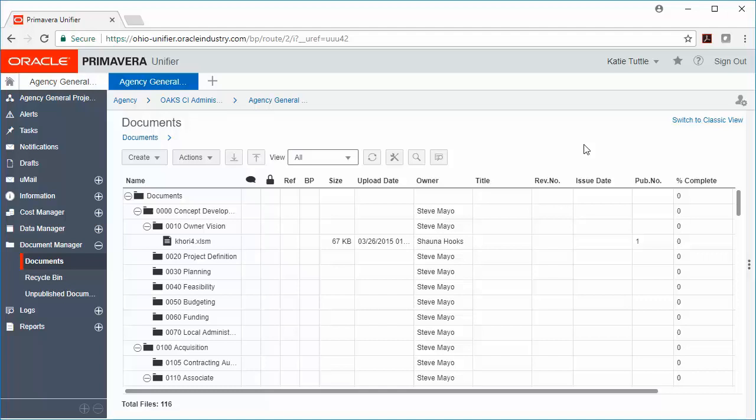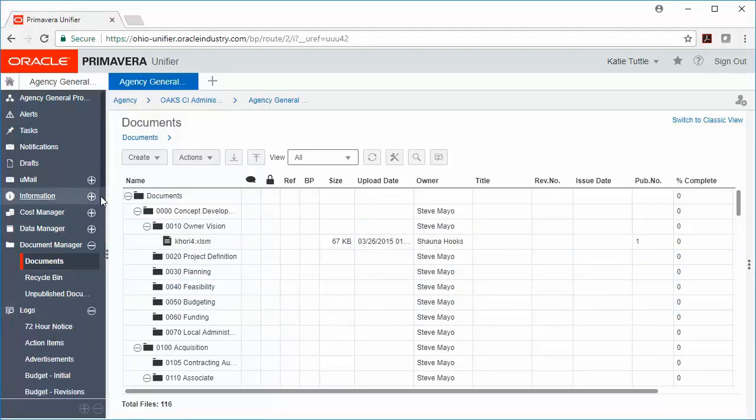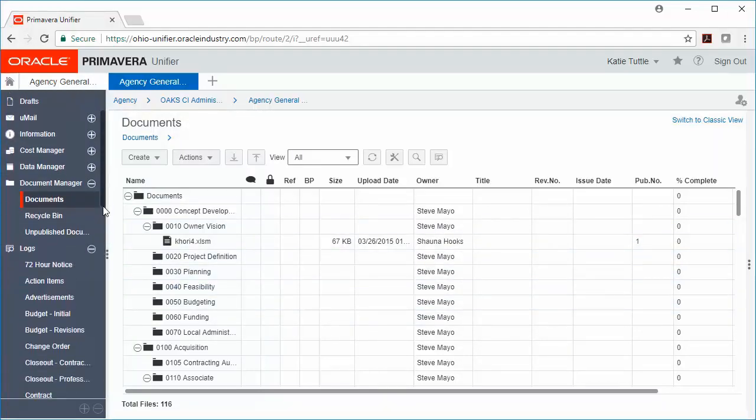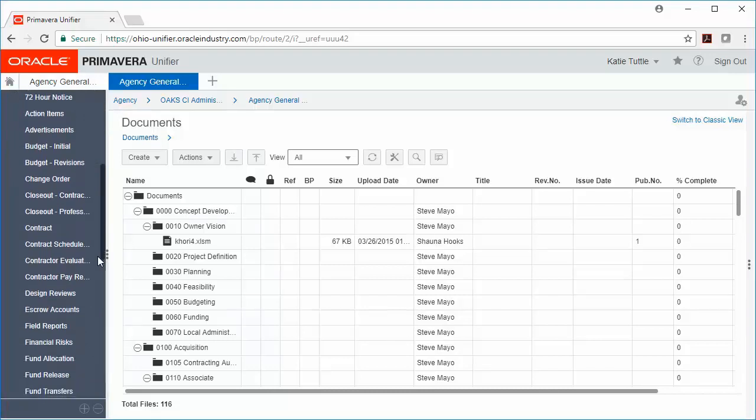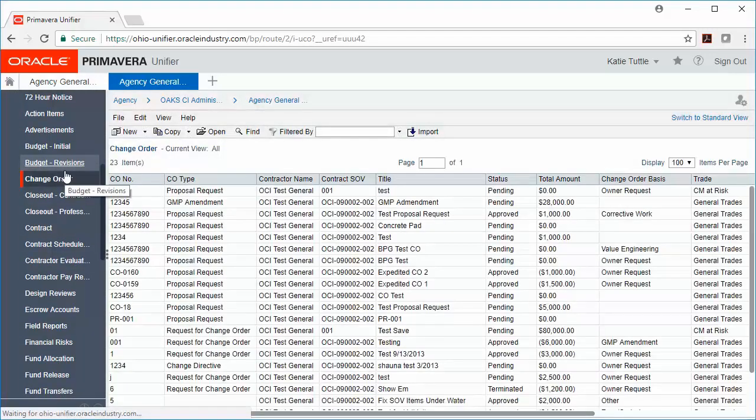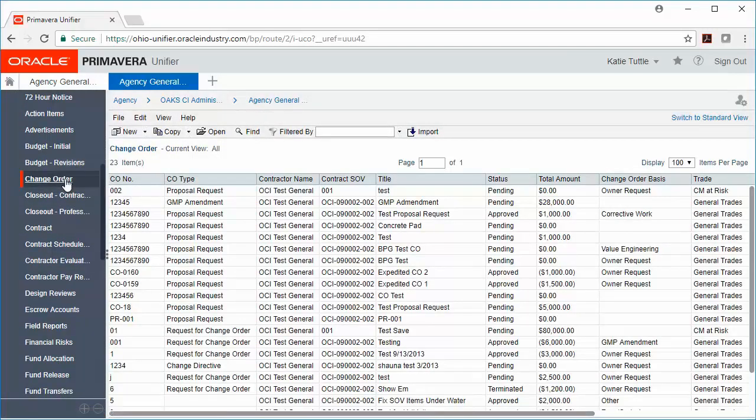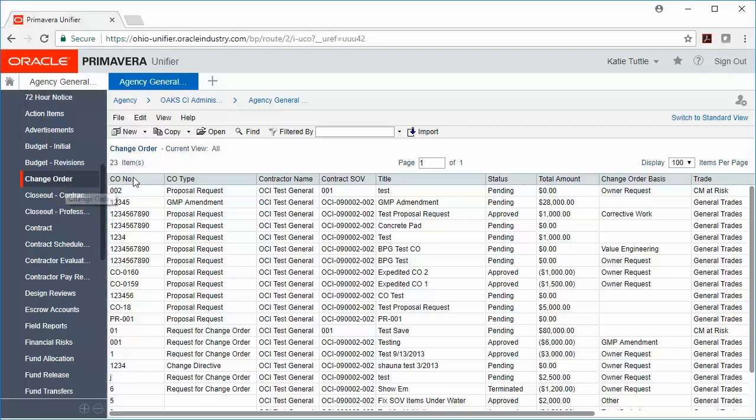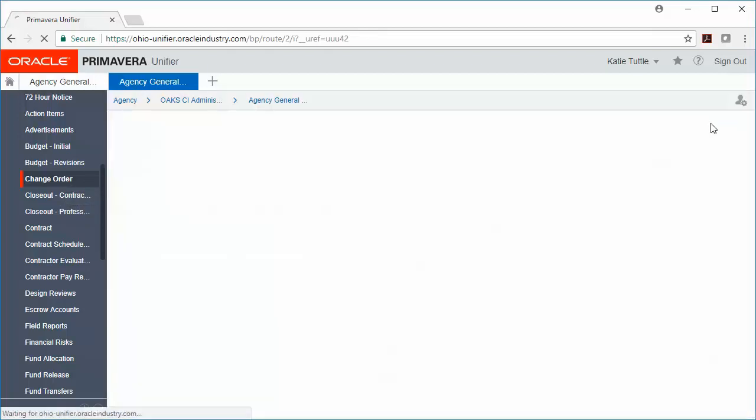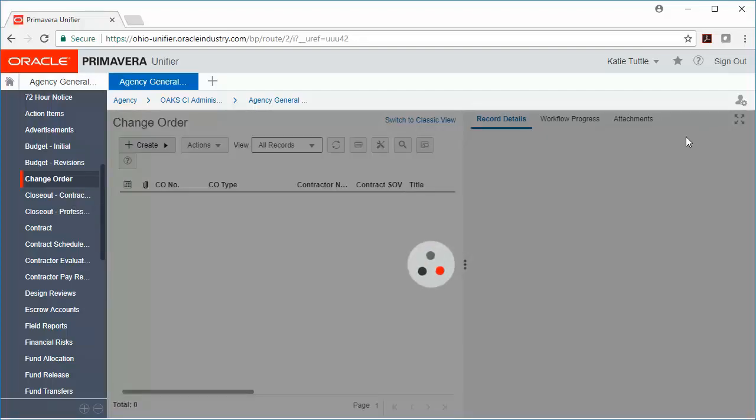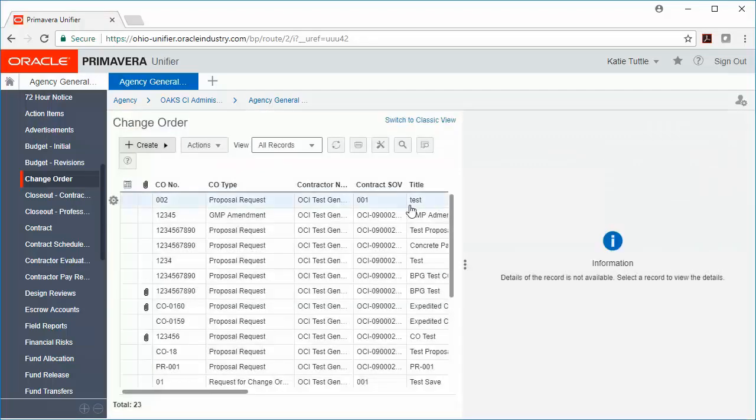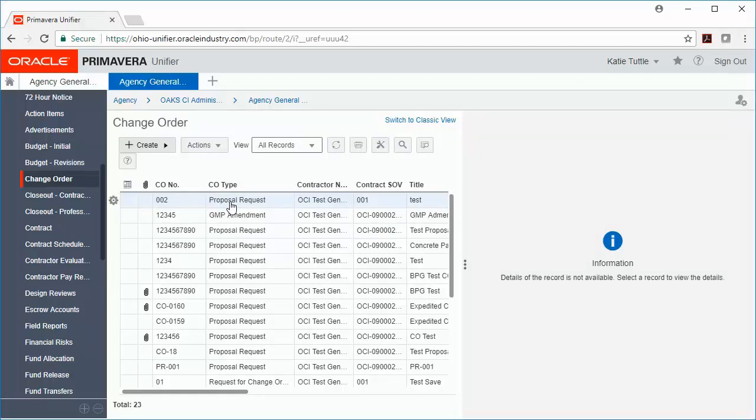Now let's move down to Logs. And then let's click on a record. For example, let's click on Change Order. In Logs, we're going to switch to Standard View on the right-hand side of your screen. And then we can see an entire list of the change orders. So when we talk about Logs, Logs houses all of the records for your project. So that's your contract, your professional services agreement, your change orders, your amendments, RFIs, design reviews. All of those records that are important to your construction project are going to be housed in Logs.